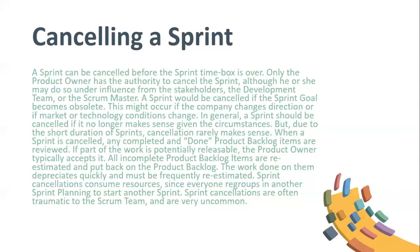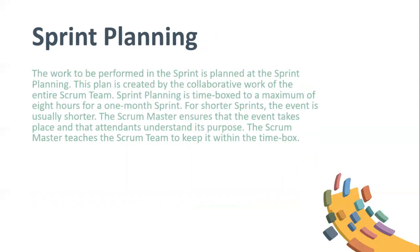Due to the short duration of sprints, cancellation rarely makes sense. When a sprint is cancelled, any completed and done product backlog items are reviewed. If part of the work is potentially releasable, the product owner typically accepts it. All incomplete product backlog items are re-estimated and put back on the product backlog. The work done on them depreciates quickly and must be frequently re-estimated. Sprint cancellations consume resources since everyone regroups in another sprint planning to start another sprint. Sprint cancellations are often traumatic to the Scrum team and are very uncommon.